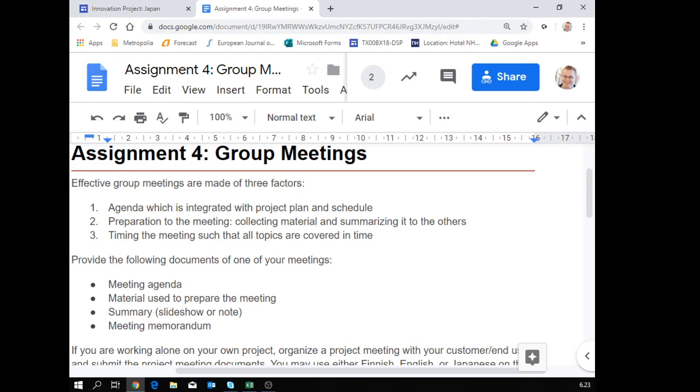So basically, if you need to do adjustments on the budget at an early stage, for example, in this meeting you see that you have spent some extra on, for example, the hardware. Then you need to balance it somewhere in here. Where do you get that money out? Do you get it from the total equipment cost? Yep, sure. If it was possible, you can do it, that's fine.